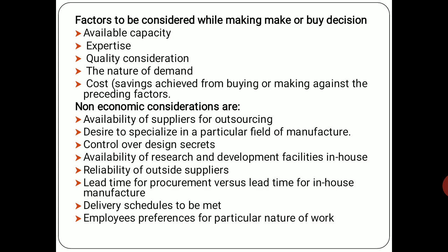So it's a time lag between what? Between whatever you are ordering and whenever you are getting those orders back. So that's the time which should not be too much. If that increases, the productivity will be nil at that time. We will not be able to take up further processes. So it's very important to consider lead time when you are making the make or buy decision, right?